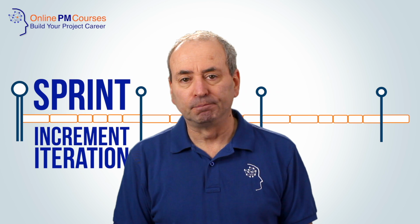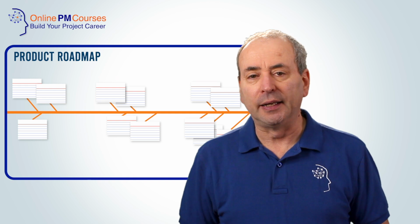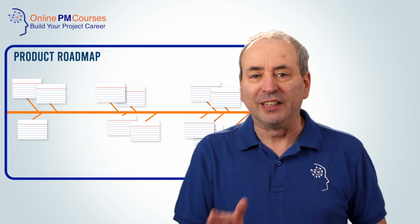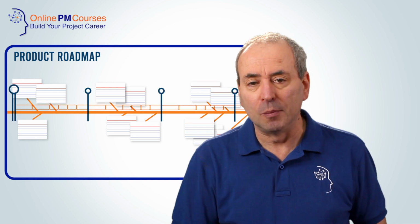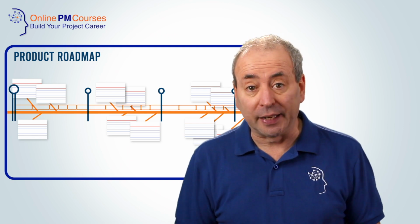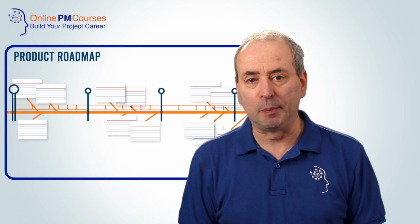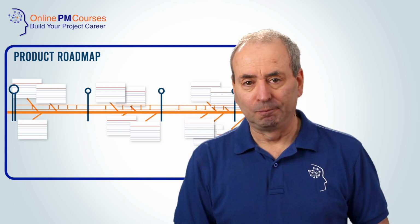These are the things that are either foundational or offer the greatest value or benefit to the user group, to our client, or to our sponsor. We use a roadmap as a tool to articulate how our project will develop different features over time, so that successive sprints or increments will develop successive features, enhancing the feature set and the capabilities of the products that we're developing. We don't worry about the details and the planning for activities that are into the future.